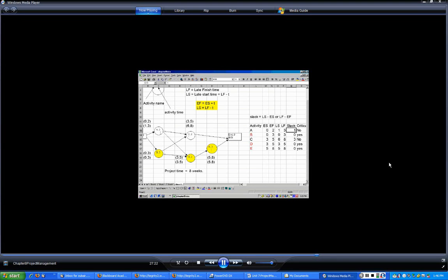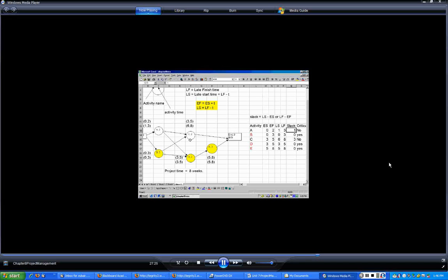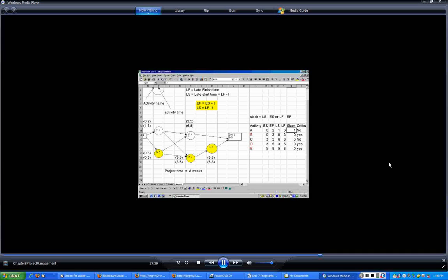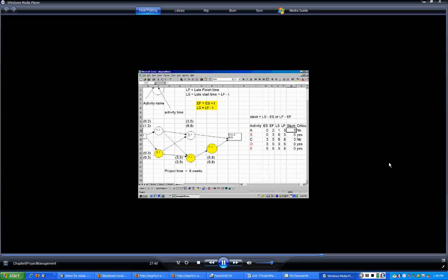These two are the activities that can be scheduled a little later, and hence do not make the place congested and make supervision hard. So it can simplify the process, and of course, since we can start this activity a little later, we can pay for it a little later, and hence the money can earn interest while we make use of it. So that's why it is important to identify critical and non-critical activities.